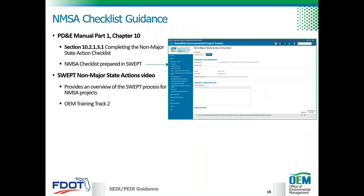The non-major state action checklist is divided into three sections: general information, the project description, and evaluation. The general information section identifies the project name, limits, county, and financial management numbers. The project description includes existing conditions, purpose and need, and proposed improvements such as number of lanes, structure, median, and right-of-way. The evaluation section provides a checklist to evaluate potential impacts, and guidance on determining impacts is provided in the topic chapters in Part 2 of the PD&E manual.